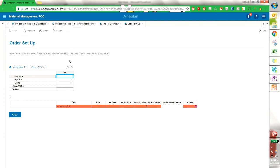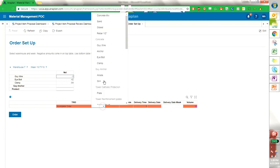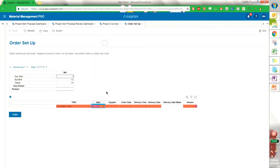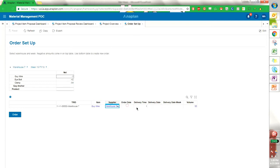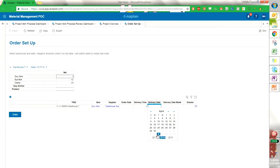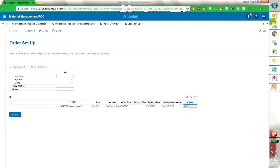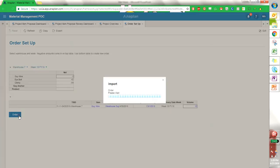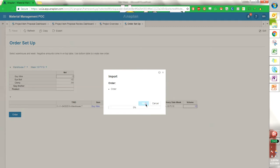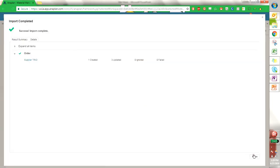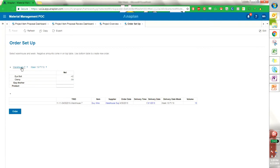So I need to fill out this order action down here. I can select guy wire, it prompts me with my supplier. I can put in a delivery date. As long as it's prior to week 19 it should appear to have affected the net. So let's say that we need it the week prior, week 18, and that our volume that we need is going to be 10. Now that I have filled out the order form, I can click order. And we see that our guy wires are gone because we would have a net volume of positive 7 based off of the prior net negative 3 and our order here.